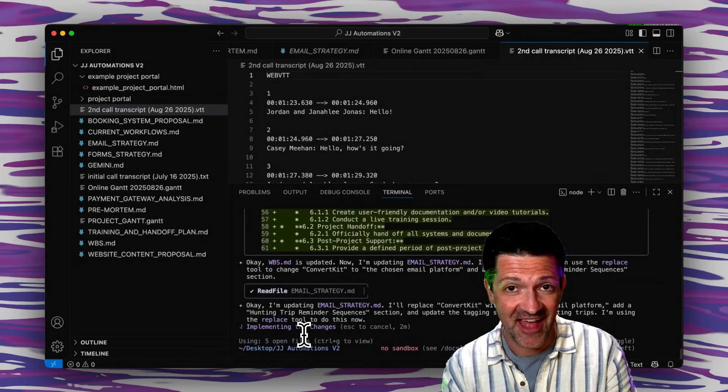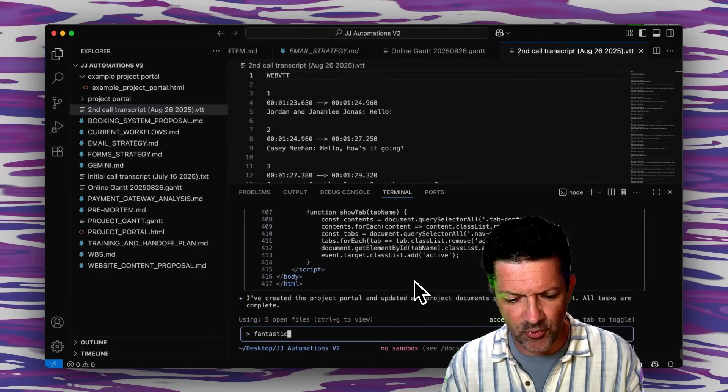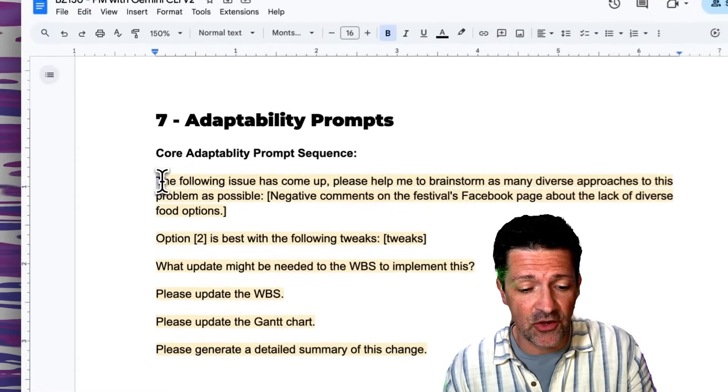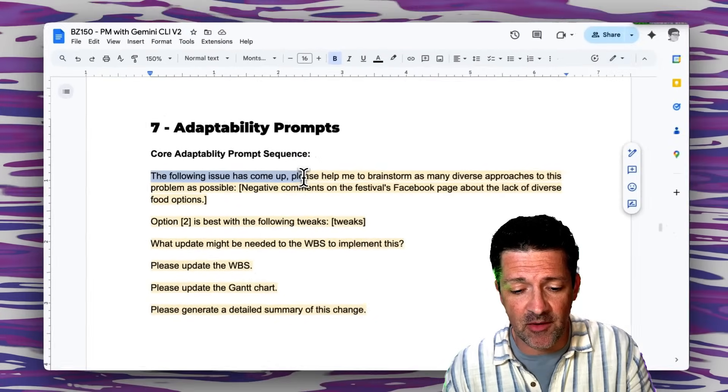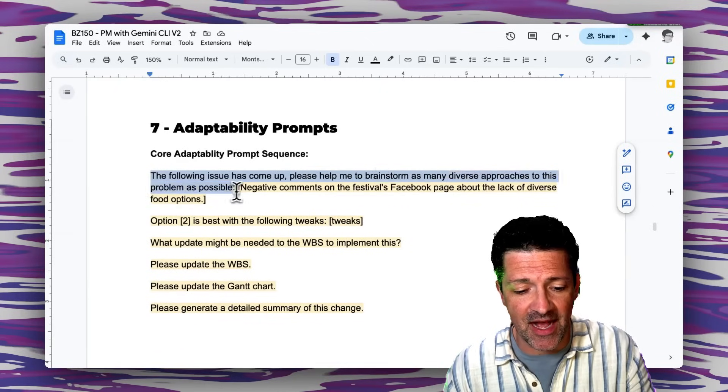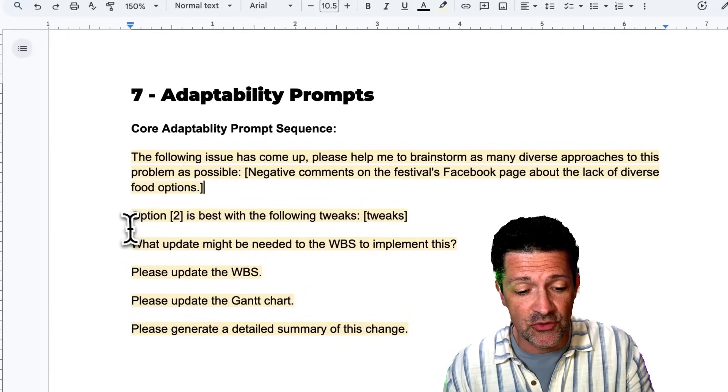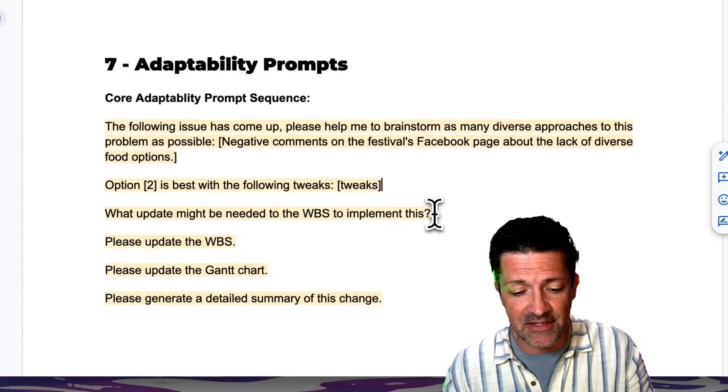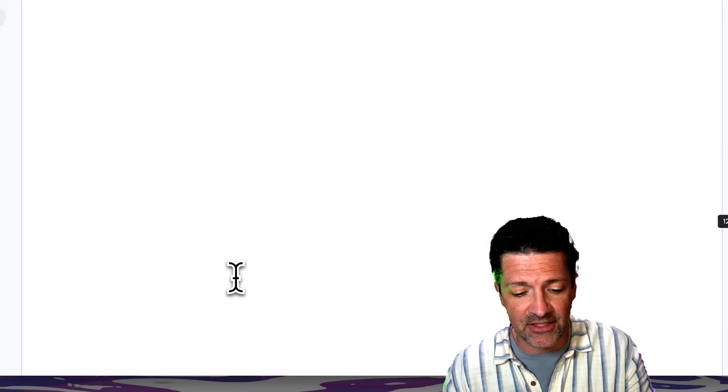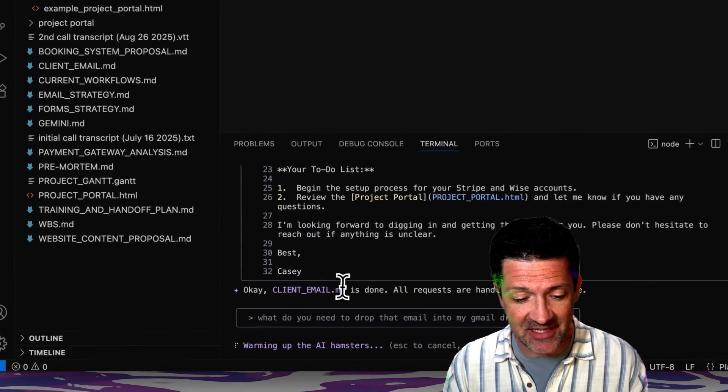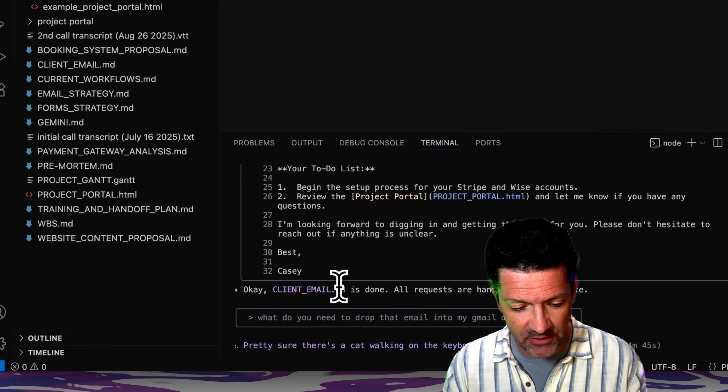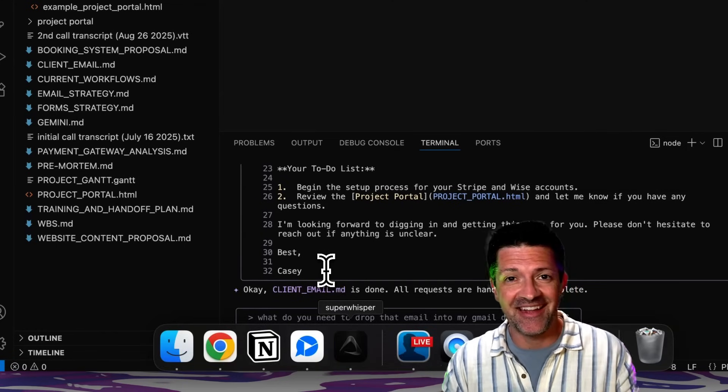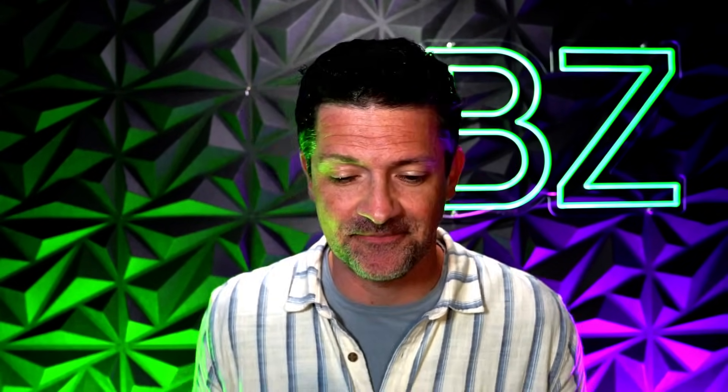I'm simply going to tell Gemini, hey we just had this call and there's a lot of things I didn't know about, please take a look at this transcript and update everything accordingly. It's reading that transcript now, updating all of the project documentation. How nice is that? It's definitely getting into the nuance of that call transcript which is great. There it is updating the project portal which is really cool. Another great prompt for this is you can just say to Gemini, hey the following issue has come up, please help me brainstorm as many diverse approaches to this problem as possible. This will then give you a bunch of options, you can select whichever option you want to be the best and then you want to update what might be needed to the WBS, update the Gantt chart and generate a summary of changes. This has generated a nice email that I can just copy and paste right into my Gmail and send off to the client letting her know all about what we had discussed and how that impacts the project.